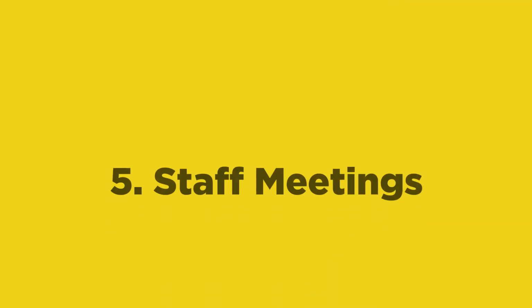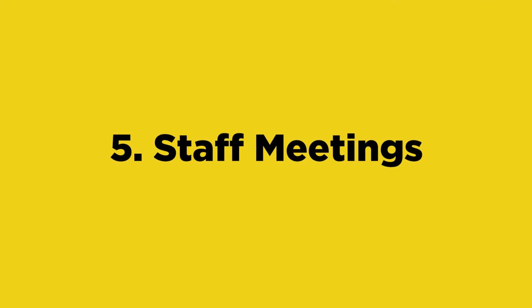And then another part of your daily tasks would be staff meetings. And so part of our project management process, we have adopted Scrum, which is a daily stand-up meeting that shouldn't be longer than 10, 15 minutes, and hold those daily stand-ups with our team, as well as periodic check-ins to stay on top of projects and tasks. And so staff meetings are really important.